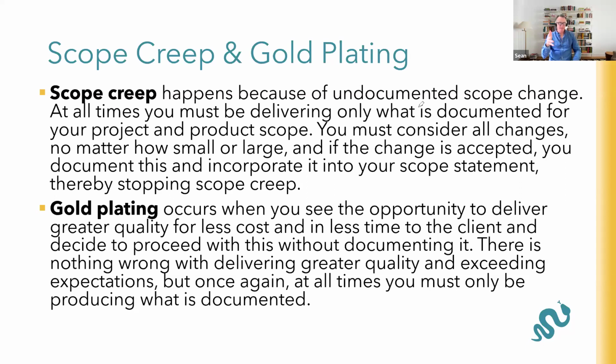And that email should have said something like, the approved document says navy blue, you want to go to sky blue. I can confirm there's no implications of cost or time. Could you please confirm that it's sky blue? And they'll come back to say, yep, I want it sky blue. There you are, you've got it in writing and it's on record. You can put that into your change register, change number 32, client asked to go from navy blue to sky blue on this day, and here's the URL to the saved email. That's how you get around scope creep. Okay, change happens, you should be ready for it, but it's got to be documented.